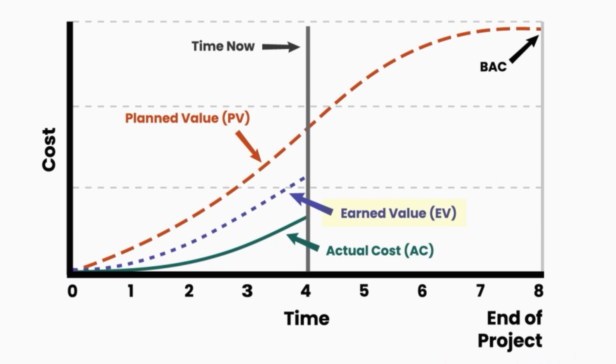Can you tell me what the dotted line represents? It says earned value. I believe you said EV is the equivalent to budgeted cost of work performed, or BCWP. You are good. In many ways, it is the most significant variable. It shows how much or how little progress has been made. That leaves us with the solid line. Its name gives away its meaning. Actual costs. That is easy enough to understand.